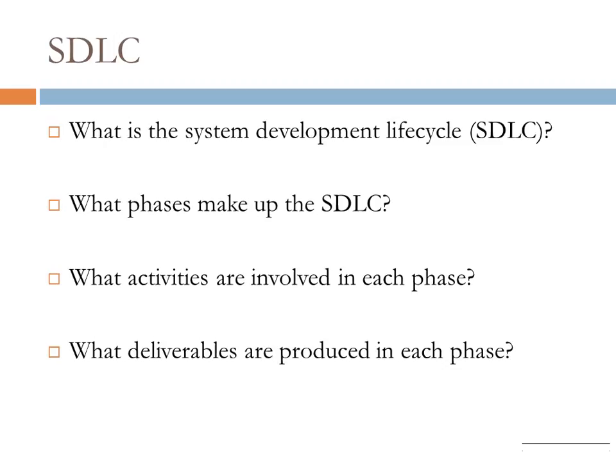So it starts off as an idea of a very simple system that's going to do X and Y, and over a series of meetings and discussions and perhaps even presentation of prototypes and things like that, the types of things that get requested just naturally start to increase. It's like, oh, okay, that's sort of nice, but it would also be nice if it could do this. Oh, yeah, that's nice, but it could also do this. And before you know it, a system that was supposed to maybe accomplish 2 or 3 very simple things is now required to accomplish 10 different things. Right, so scoping the project and understanding the scale of it is absolutely critical.